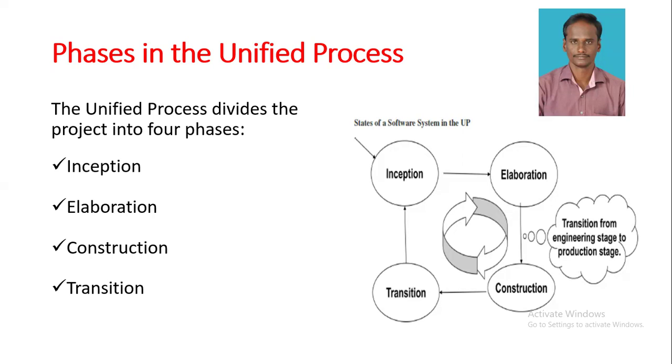In the transition phase, all activities required at the time of delivering the software product are carried out. Beta testing is conducted when the software is delivered to the end user. The user feedback report is used to remove the defects from the created system. Finally, the software team prepares user manuals, installation guides, and troubleshooting procedures, which make the software more usable at the time of release.